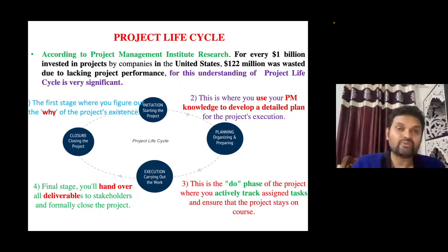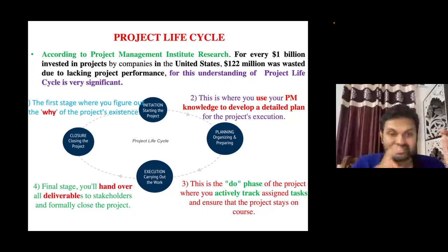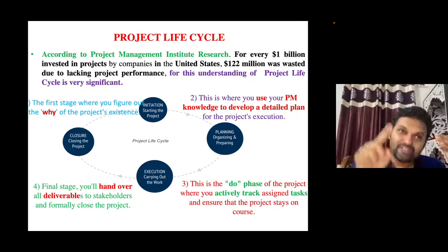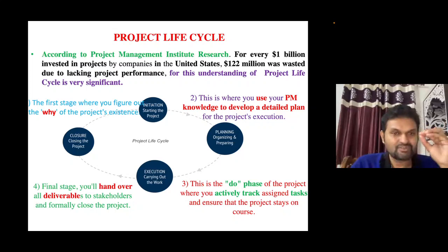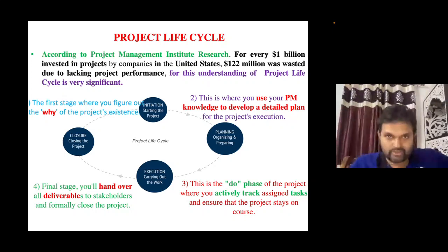And the last phase is the handover or delivery phase, which we consider the simplest one, but it is one of the toughest, because in that phase we need to make the reconciliation statement. Whatever the frontline engineers and managers have done in the initial or mid phase of my project, we need to take care of it and wrap it up positively at the end. It is a struggling phase. We need to make sure that all the documents are in place, everything is as per the contracts, we have done all the checklists, and everything is taken care of at the closure reports.